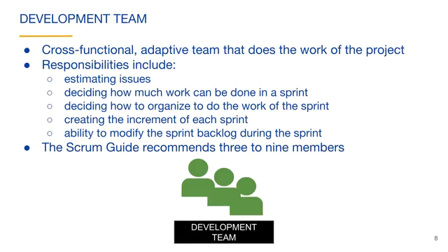The Scrum Guide recommends having from 3 to 9 members of the development team. Fewer than 3 members decreases the productivity and quality created by a cross-functional group of people working together. More than 9 members tends to increase the amount of coordination required. Jeff Bezos at Amazon refers to 2 pizza teams, meaning 2 pizzas should be able to feed the entire team. To scale Scrum to more than 9 people, it is usually better to create multiple teams.